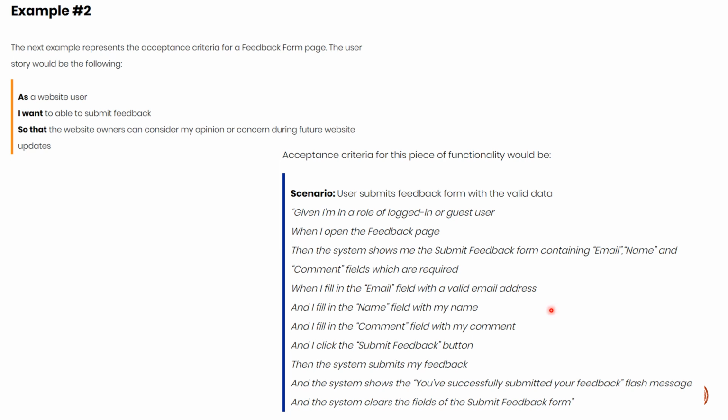You can add another acceptance criterion: given the situation, when a person is giving a wrong email address, then it throws an error message saying that the email is invalid, right? So this is how we can create a number of nicely written acceptance criteria in a BDD format. Yeah, a small story can have as many acceptance criteria as possible to ensure the built-in quality or system quality, whatever you are using as a definition of done.